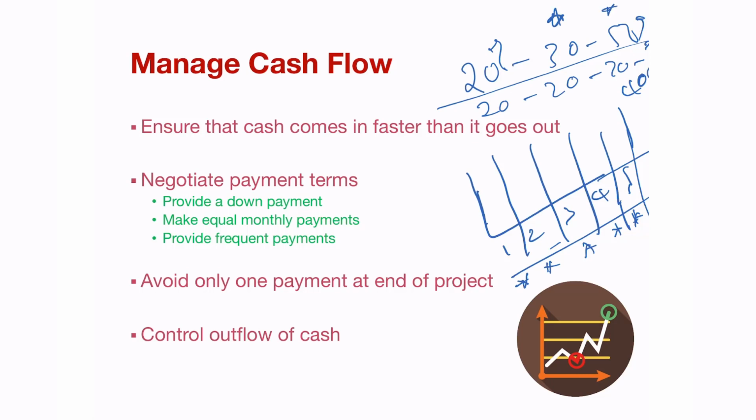In that way you carry the cost of managing the project, and that is not a very good way of running a project. What you want to do is negotiate a contract where you have fixed milestones along the way in which there are payments that need to be delivered. There's normally a small payment up front, and that covers initial startup cost. Generally it is in 20% increments. So when 20% of the project has been completed, you must get paid 20%.